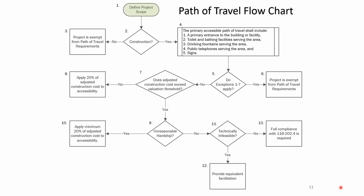You start with defining the scope. Once you have the scope defined, it goes to all-important box number two. If you are doing no construction, you go to box number three and the project is exempt from path of travel requirements. It doesn't mean the project is exempt, but the path of travel won't be triggered. That might be a change of occupancy or change of use where a client says they're not going to do any construction — just change the occupants or the function of the space.